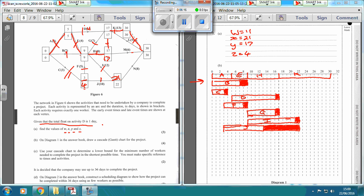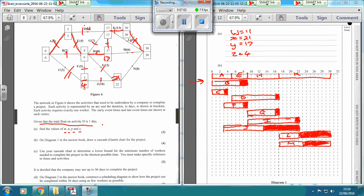K is already done. L can start at 17, go up to 22, and can finish at 30. M can start at 17, and going down for 6 days takes us up to 23, and that can go up to 30.